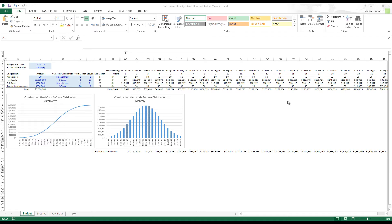The third — and the whole reason I built this model — was for the S-curve distribution. Think about it in terms of hard costs and construction. The first few months you're going to be ramping up, spending less. Then as construction heats up in the middle of the construction period, that's where you're spending the most. As construction winds down, you spend less and less. If we graph the monthly cash flows, it looks like a normal distribution curve. On a cumulative basis, it looks like an S tipped over on its side.